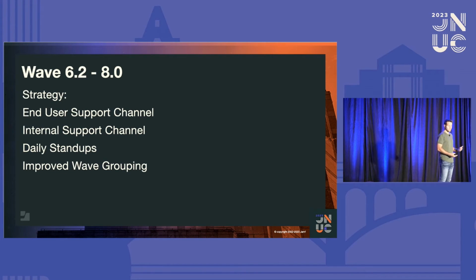So that was great. The other thing we realized we needed to do was separate our VIPs out of these waves. Trust me, there was a Sunday lockout that took 2 hours to remediate.